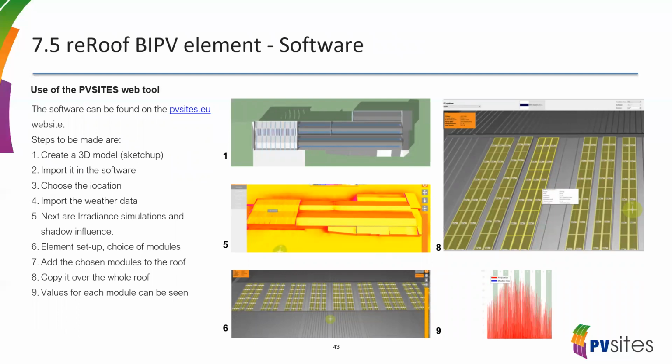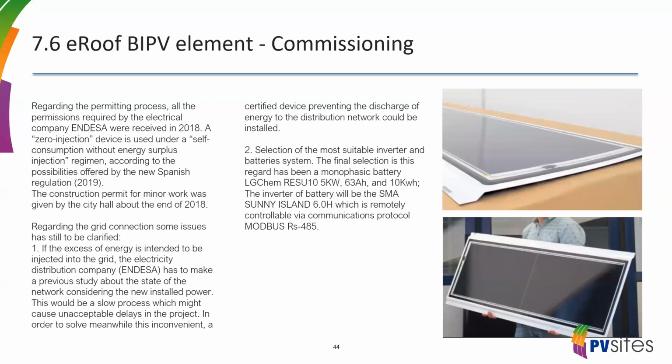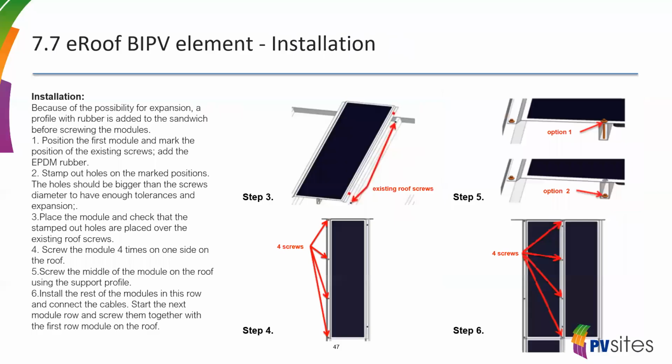There's the calculations with the software. Next one, go to installation, no problem. The installation was actually done in the summer last year, and it was the hottest time of the year. It was almost impossible to work on that roof. So the normal working days of 8 hours a day were pretty reduced, I think, because it was too hot to handle there.